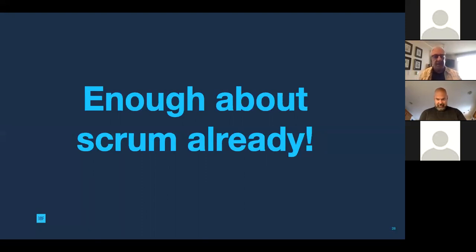And so it's just keeping the epics in a place where you can just review them. You're at kind of a different level, and then splitting out workable user stories for the team to work on works really well. There are online tools that will tell you if an epic has been split into 22 stories, how many stories have been completed, and therefore what percentage of that epic has been done. A little over the top, but it does make things manageable and trackable, and it makes managers happy. So it's worth doing just for that.